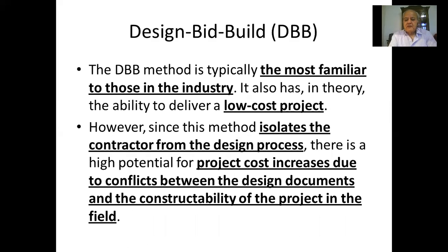The problem with design bid build is that it wastes a lot of time. You have to finish the design, the working drawings, the specifications, the bills of quantities, and then get the bidding and the contract. This is a long process, and by the time you finish it, prices are going up and materials are changing and so forth. And also the problem of selecting based on the lowest cost.